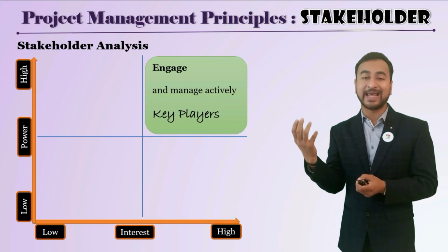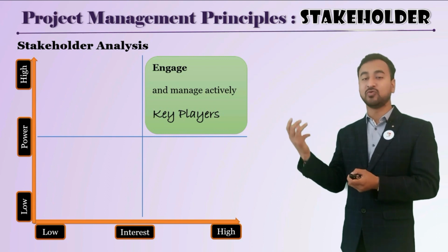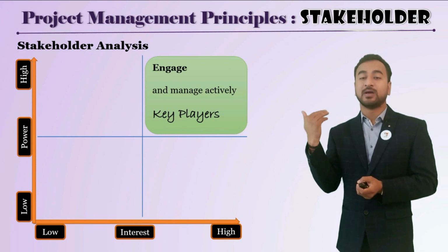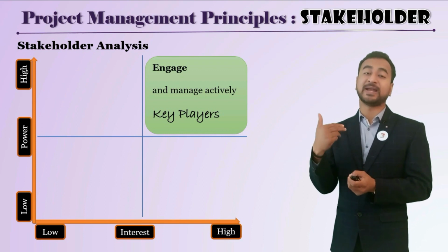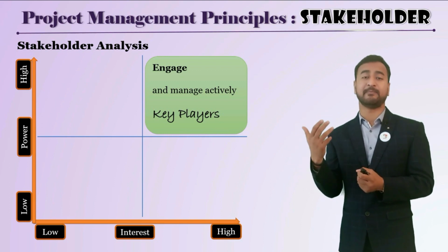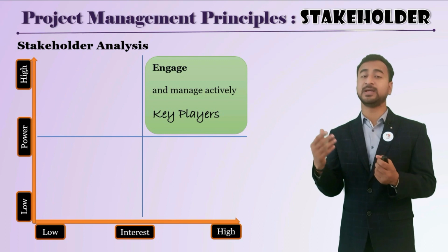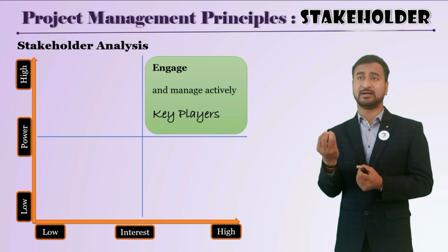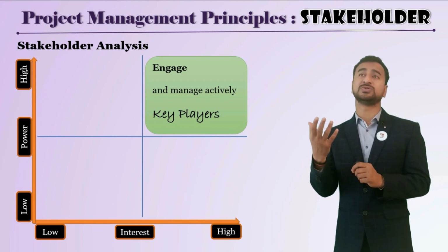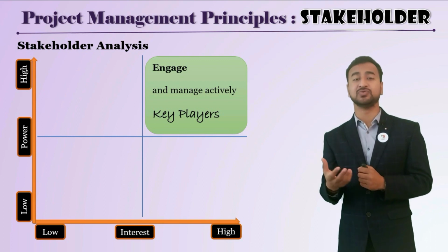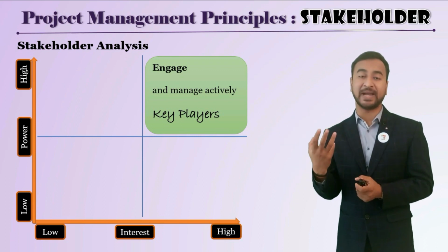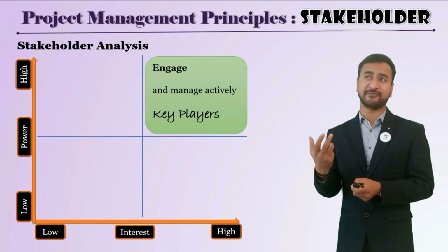So you have to engage and manage those stakeholders actively, because at any given point of time they can change or impact your project. If you do not maintain their interest, the project outcome would be affected, especially with certain key stakeholders like your client and your suppliers. Suppose your suppliers stop providing you the raw material and your deadlines might change, so you have to manage or engage with those stakeholders effectively.